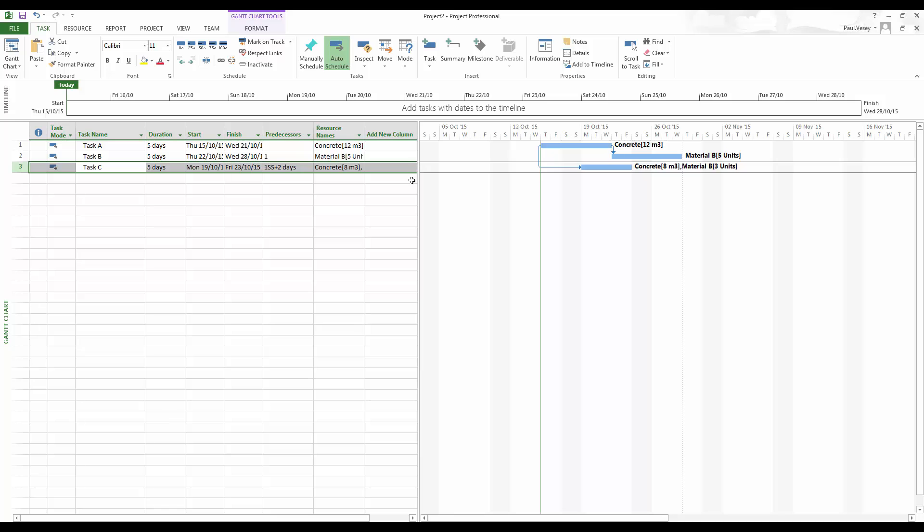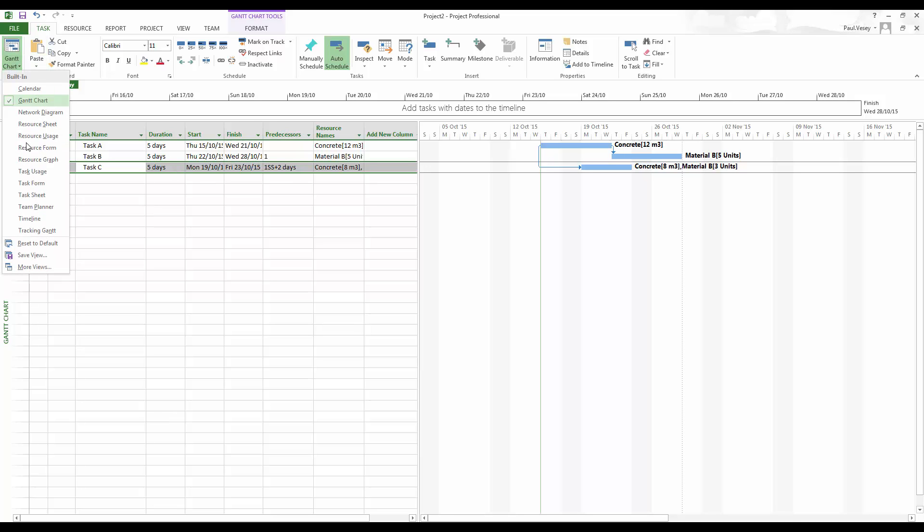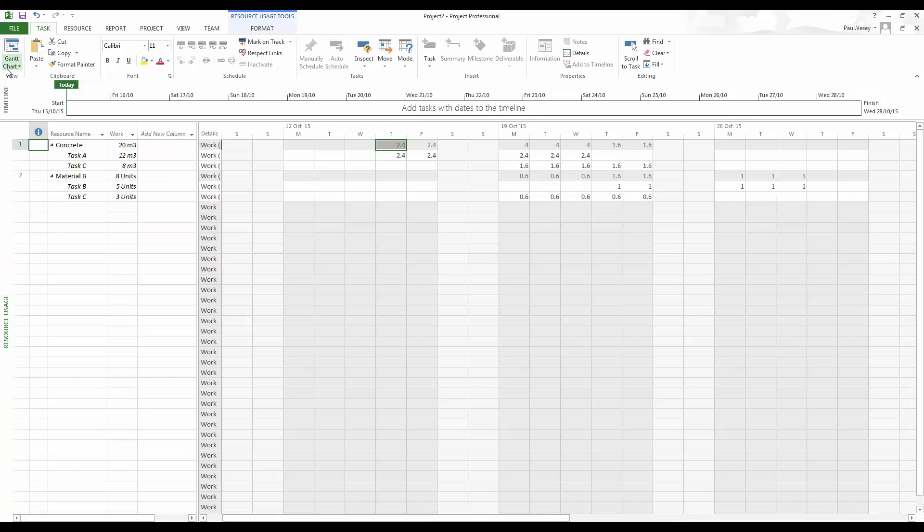We can pull some extra information out of this as well. So if I go into the resource usage, for instance, there, we can see concrete while we're using a total of 20 cubes based on this schedule. And we can also see the days when it's all going to be required.